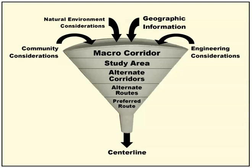As you go through the GIS analysis part of the project, you will analyze these considerations simultaneously to objectively determine the most suitable line location. To do this manually would require many man hours of work, would be less accurate in the final outcome, and could lead to increased litigation, project delays, and cost escalation because of a lack of objectivity and transparency.